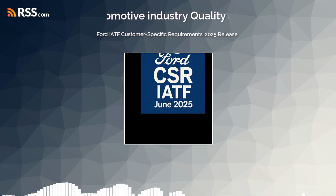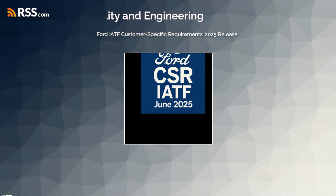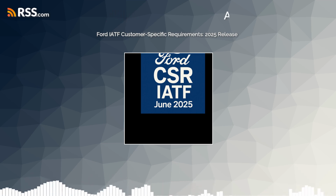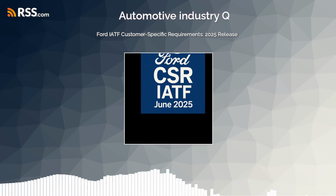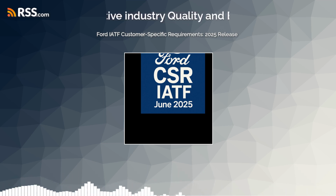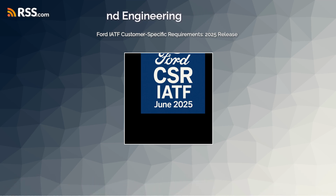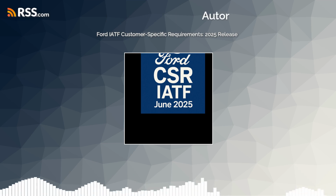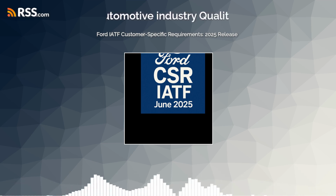Yes. It's distinct from design changes, which typically go through Ford's WERS system. SREA ensures that any proposed changes to the manufacturing process by the supplier are formally reviewed and approved by the relevant Ford engineering and quality teams before they are implemented on production parts. There's also a specific SREA process outlined for changes affecting service-unique parts. Got it. Formal process for any tweaking after approval.